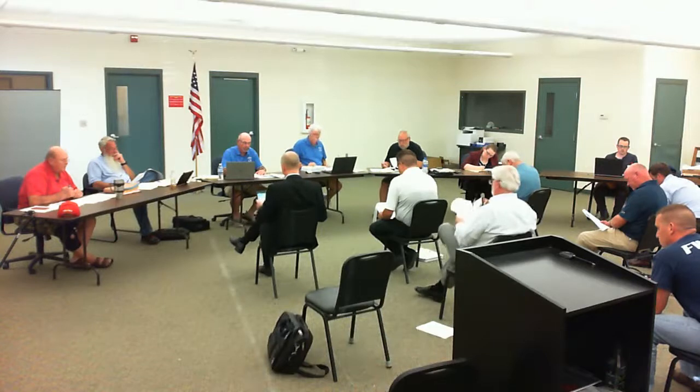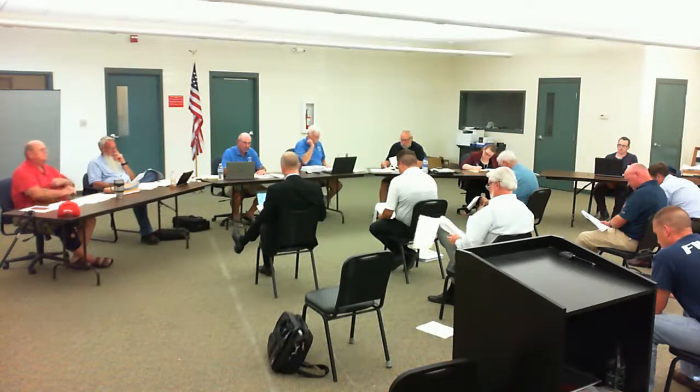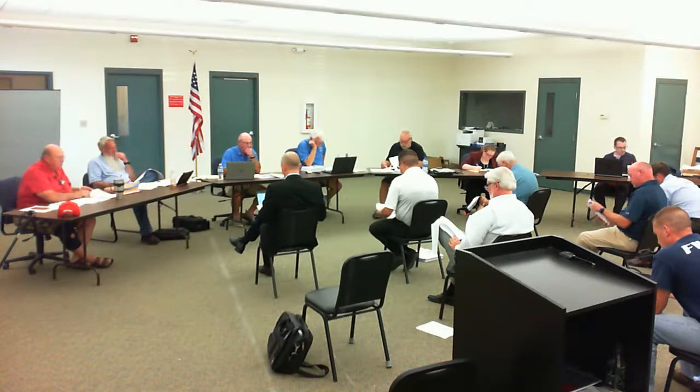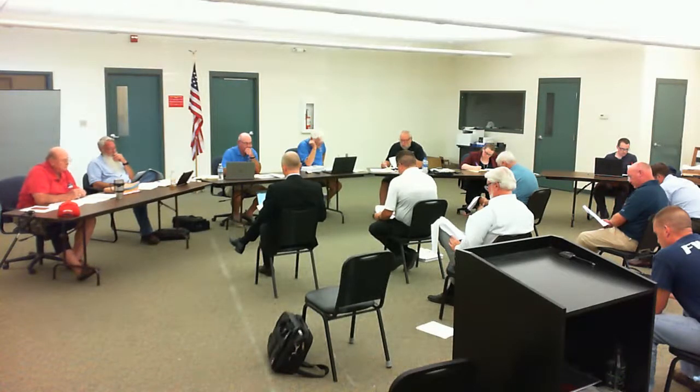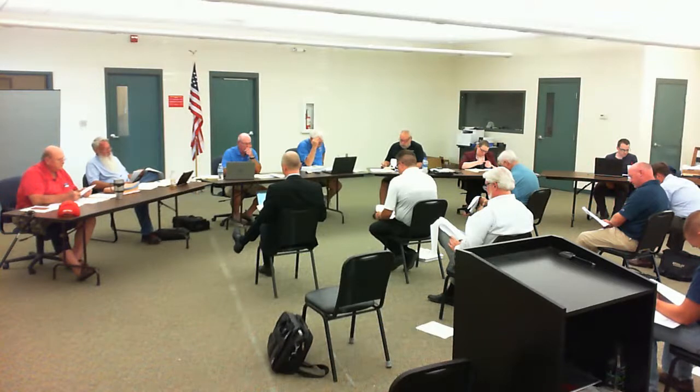That question was brought up earlier regarding what's going to be financed, or what's the breakdown of the project that will be funded through the SRF. That's page 14. So we've got 3/5 of the total meter replacement, about $720,000. The west tank rehabilitation, $2.1 million and change. State Road 75, State Road 28, County Road 0, the ER asset management plan, flooring system improvement, Armstrong Road.